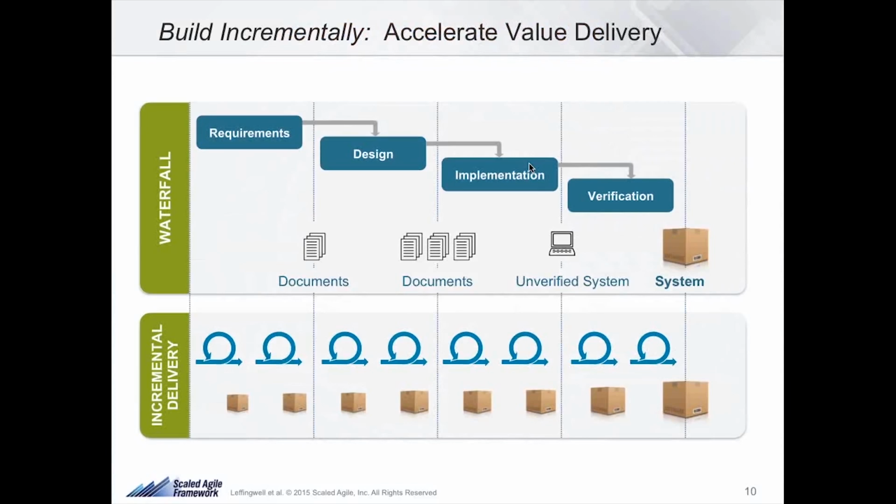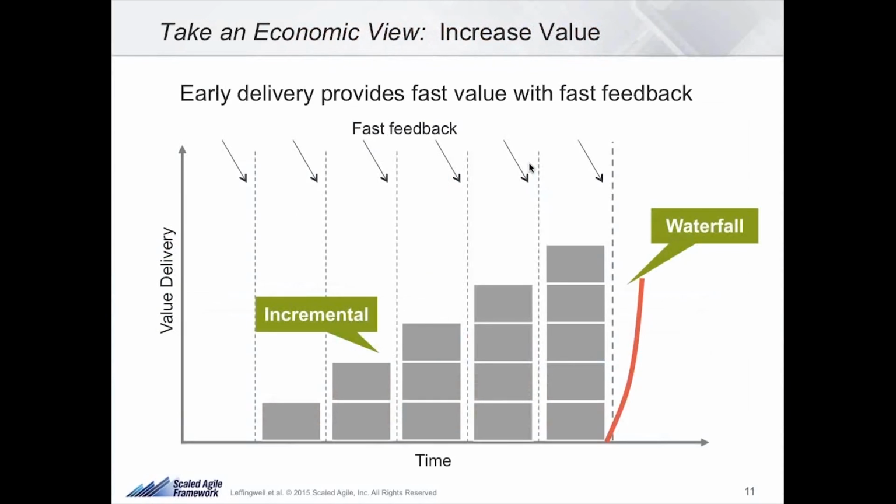I'll compare that to incremental delivery down below, which is that within a few weeks, maybe an iteration or 2, or maybe a PI of 6, 8, or 10 weeks, we're going to deliver a box of something that works. We'll install that box and let you evaluate it. And if it's not quite enough for you to deploy yet, we'll create an environment where you can evaluate it. We'll get that feedback, and those learning cycles will continue throughout the process. And that's fundamentally different, right? Different than our stage-gated process. It really brings agile and incremental delivery to provide that value.